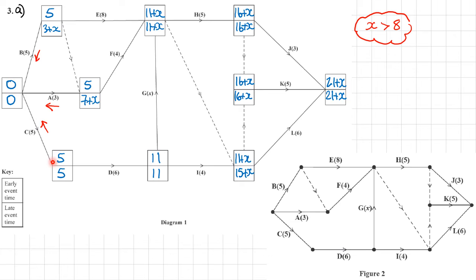And then we're just now working back just to check. And it looks like it's going to be this event minus the actual time here, the duration, to give us 0. None of these other ones will give us 0. So when it comes to critical path, it looks like we're going to be looking at this event here, or this point here, as part of the critical path.